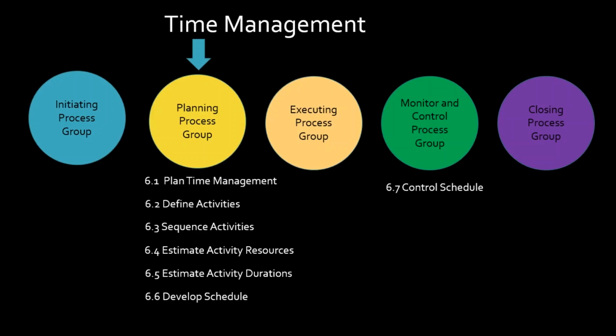Well, they may ask you on the exam. Level 1 is the project itself. Level 1 is the entire project. Doesn't that make sense? It's the top of the pyramid. So level 1 is the entire project, the widget management system in this case. Level 2 is the first natural breakdown from that. In other words, you have the 5, 6, whatever top categories that are going to need to be completed in order to satisfy the level above.